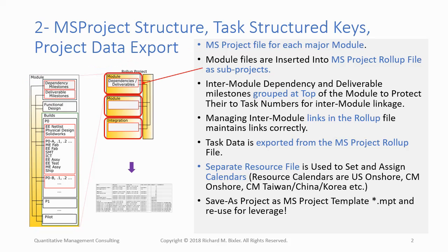In addition to MPP files containing all the element GANTT plans, create an MS Project file to be used for roll-up of the element GANTT plans, and insert each element MS Project MPP file into it as a sub-project using MS Project menu Project, section Insert, Sub-Project button.